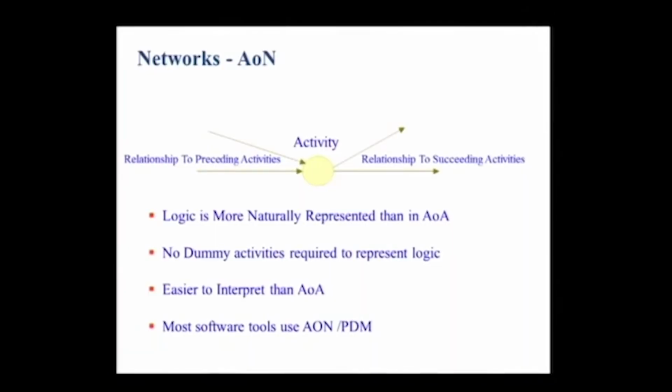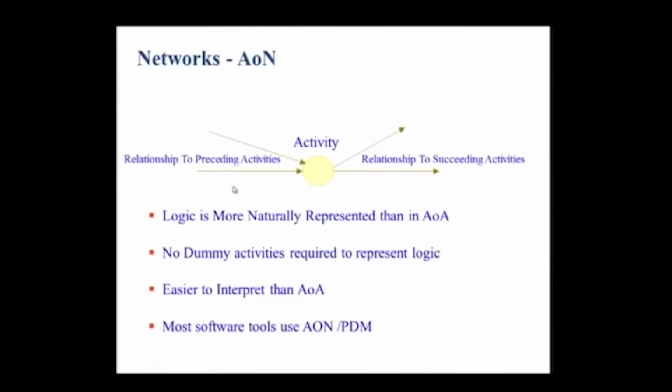Now let us move on to activity on node. Activity on node was proposed as a good way to do hand calculations for CPM. This was what Fondal had written in his paper. It was some of the work he did for the US Navy, and he said, look, you can now use a technique which uses activity on node, and it's intuitive, so you can do hand calculations with it. Activity on arrow, for large networks, needed a computer program to do the network representation and calculations, okay.